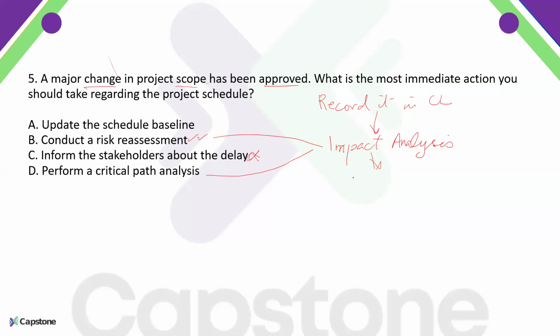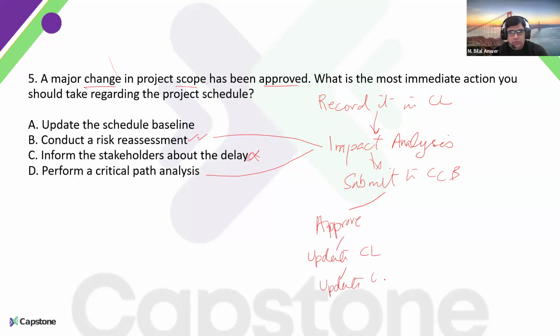We do the impact analysis, we submit it to the change control board, and they approve it. So we update the change log and we update the baselines.